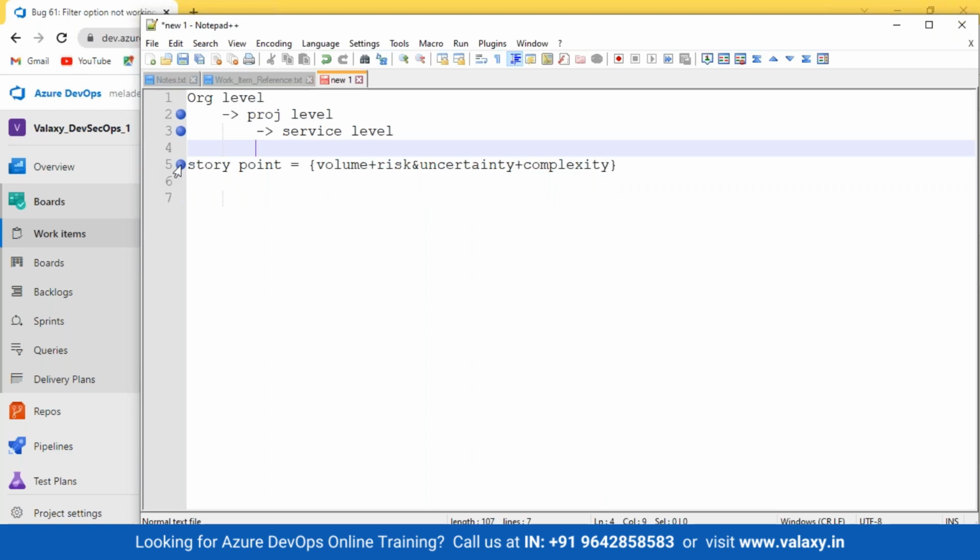Same goes in your example also, like when you, being a DevOps engineer, when the user story is assigned to you, depending upon what task has been assigned. Like if you have been given a task to set up the complete infrastructure using infra as code. Now the complete infrastructure is very huge. You have 100 VMs, you got multiple networking devices that need to be connected, you need to define CDNs, you need to define the backend databases. So this is very complex. So one or two story points will not do.